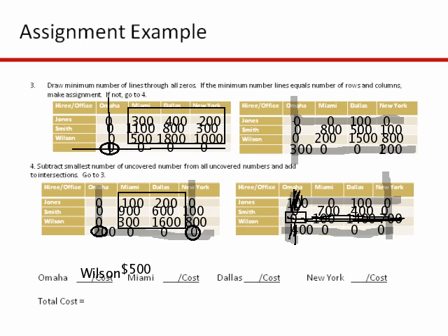And again, I can see that it looks like Smith to New York has only 1 zero. Here it is. Okay, so the Smith row has only 1 zero. So I'm going to send Smith to New York, and that is going to cost me, if you look at the original costs, it's going to cost me $800.